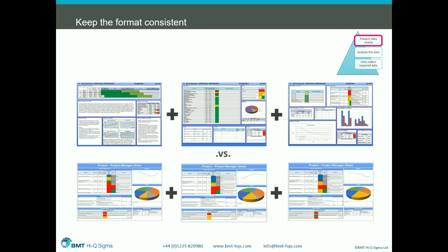But once you've got a dashboard, I'd urge you all to keep the format consistent. Again, it's very common where actually we all go off and create our own dashboards because we like a certain way of how it looks. But imagine if you're a program director and you have to review 6 project dashboards, and if they look and feel completely different, then they're going to spend time trying to work out, well, where's the milestone information, where's my cost information, where's my escalated risks?